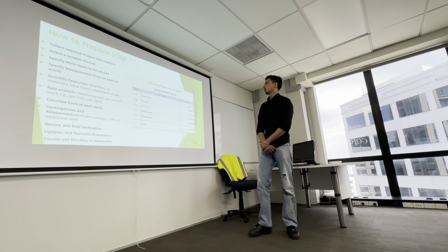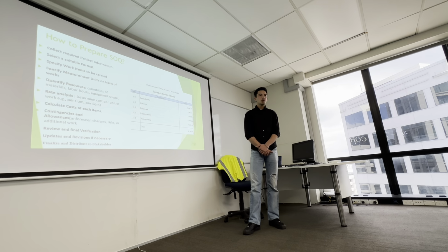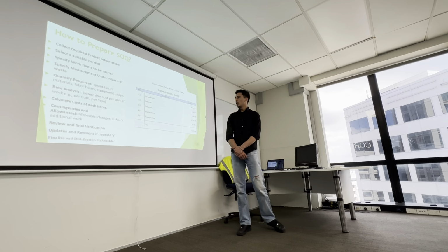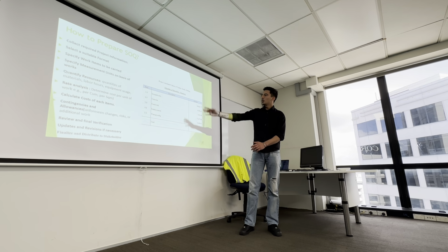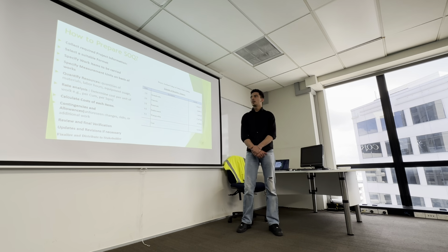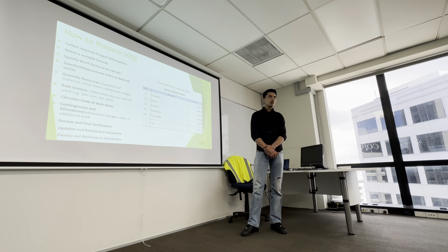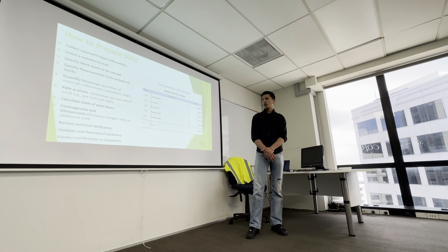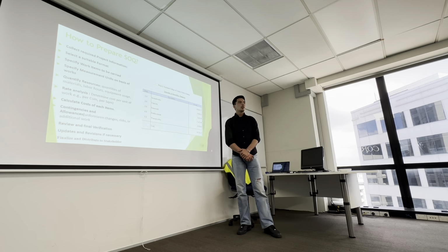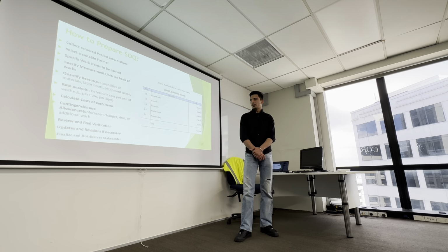This is how to prepare an SOQ. For preparing an SOQ, we collect required project information, and here is a suitable format for preparing it. We make a table like this in which we display items, descriptions, and their amount. Specific measurement units we use are meter, square meter, cubic meter, kilogram, tons, etc. Quantifying resources like quantity of materials, labor, skilled labor, unskilled labor, their pay rate per hour, and equipment use.